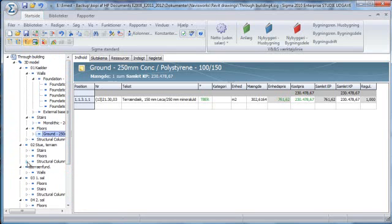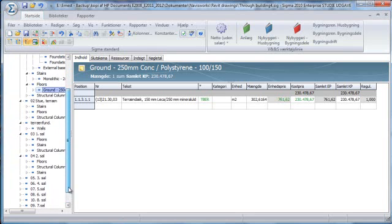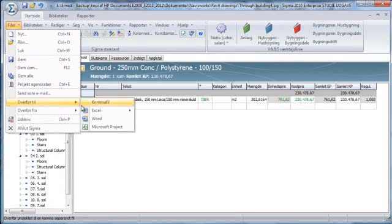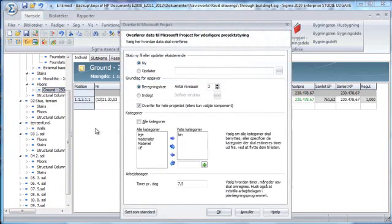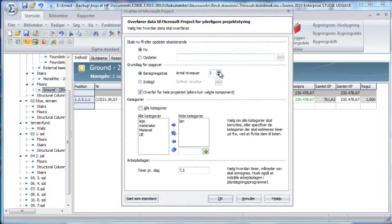I have the basement level, the ground floor, the first floor, second floor, etc. I then sent this over to the Project by exporting using this add-in again, exporting the wages part. This works best in the Danish version, I must admit. Choose the number of levels according to the detail you want to see in your calculation and planning.